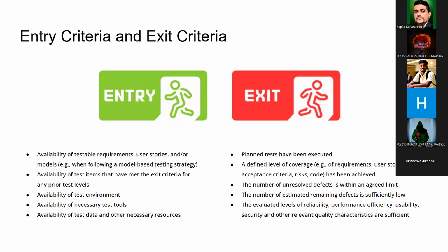So think like that: if you have 100 test cases, but you only executed 80% of them, because the rest are blocked because you don't have test data, then your coverage is 80%. Then you can say, I have documented that we need to have 100% coverage and everybody agreed. Because I don't have 100% coverage now, it's not ready.